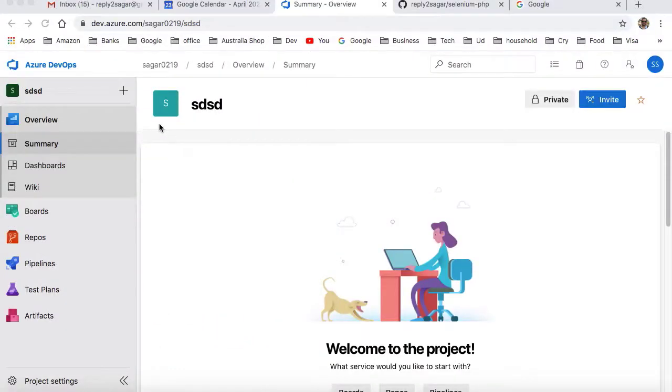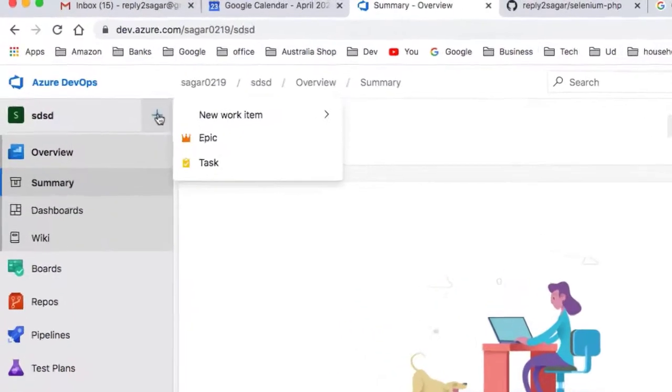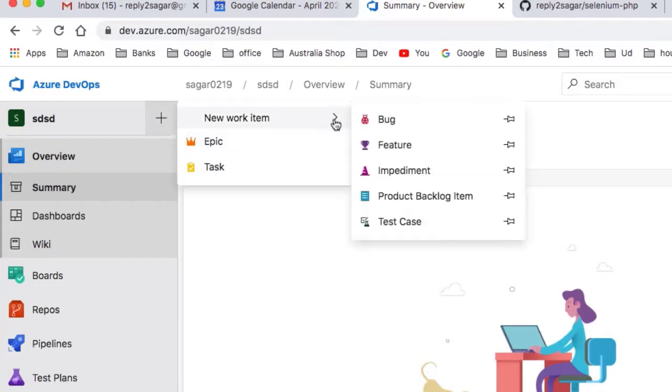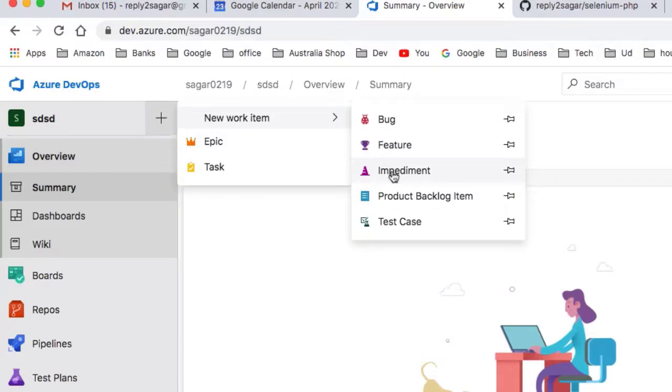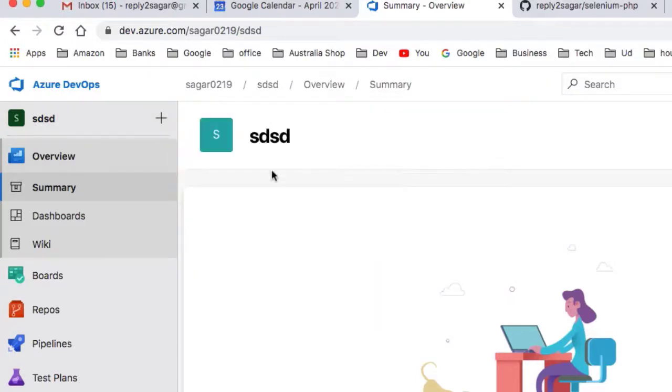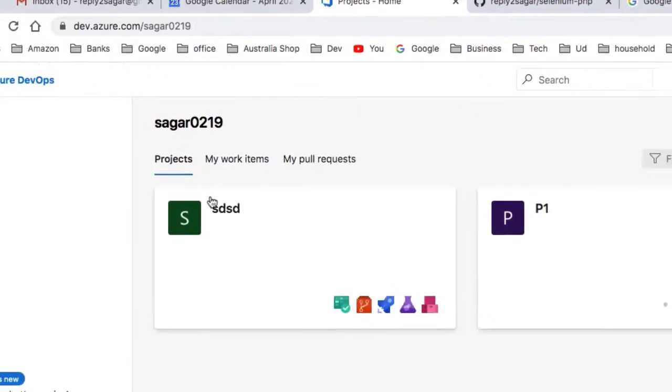This video explains how you can add different types of work items in an Azure DevOps project. For example, by default you can see only epic, tasks, and issues, but bug, feature, product backlog item, and test case options are not available normally. So how you can get these types of work items?